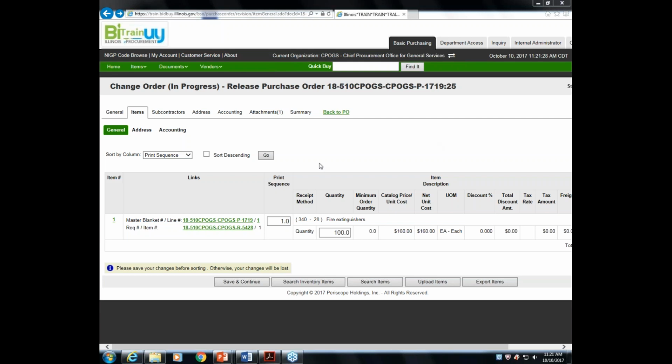And that was a great answer, because as I pulled up our questions, that is one of the questions that someone submitted and said, for auditing purposes, there's a paper contract on a release off master. Is it required to have the BidBuy purchase order? And so that was, in fact, the process that we just demonstrated, where that final executed purchase order is attached and made a part of the procurement file.